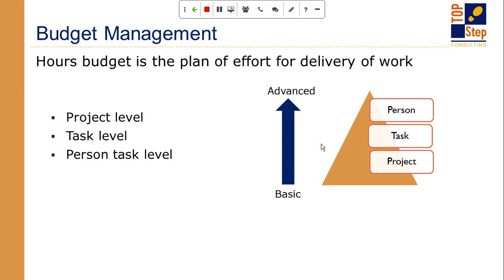So if you can break those hours down not just to the task level, but to that lower, person level, which is much more advanced, and I realize it's a lot more work, it gives you a whole lot of control from a project management perspective on where the cost is going to hit, what types of resources are going to hit, and what the timing is for that hit. And now you have multiple ways to look at the project delivery, not only subjectively but objectively, to see how the burn is looking from a numbers perspective, both from a schedule and a budget perspective.